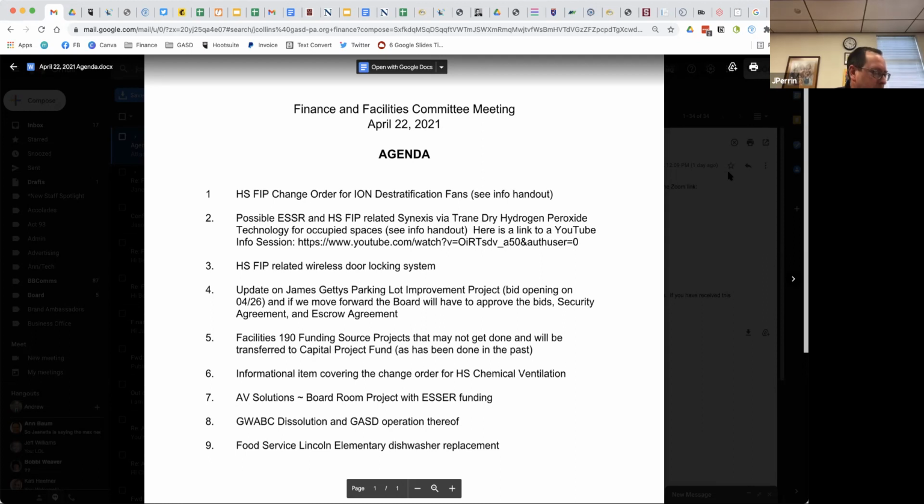Thanks. And just to clarify, some of these projects could actually be standalone projects that are in conjunction with the building project. They wouldn't necessarily have to be a change order. Correct. This particular project, this classroom door access, can be purchased through CoStars, and it would not make sense to do it as a change order where they get to tack an additional 10% on top of the cost. Right. I think what Carrie was just pointing out, using the change order as an example, is understanding that not everything we've covered so far are change orders.